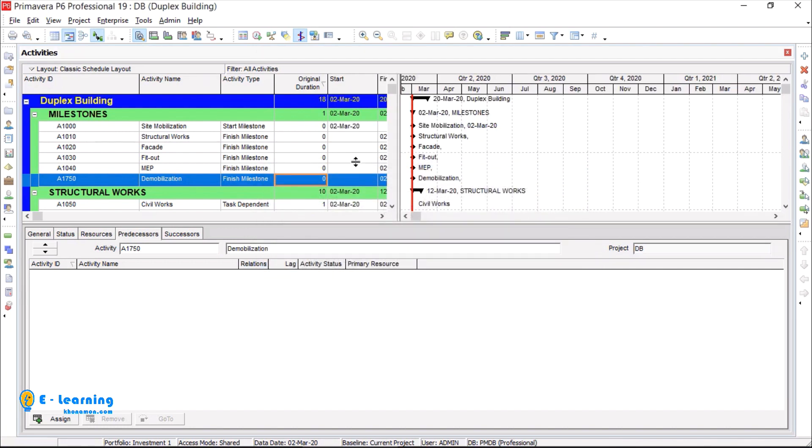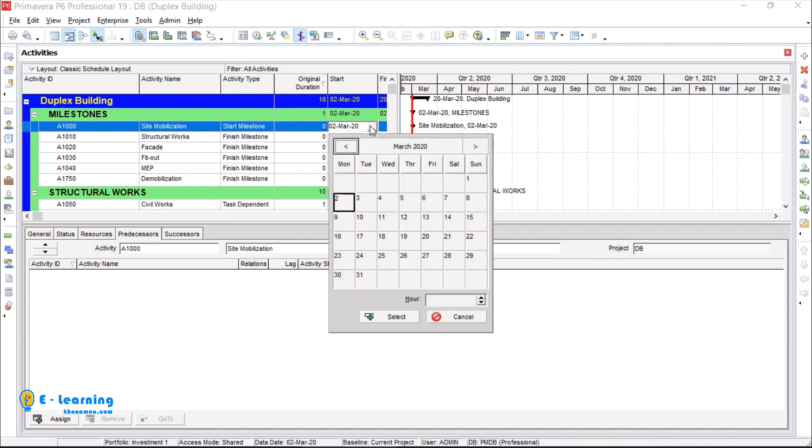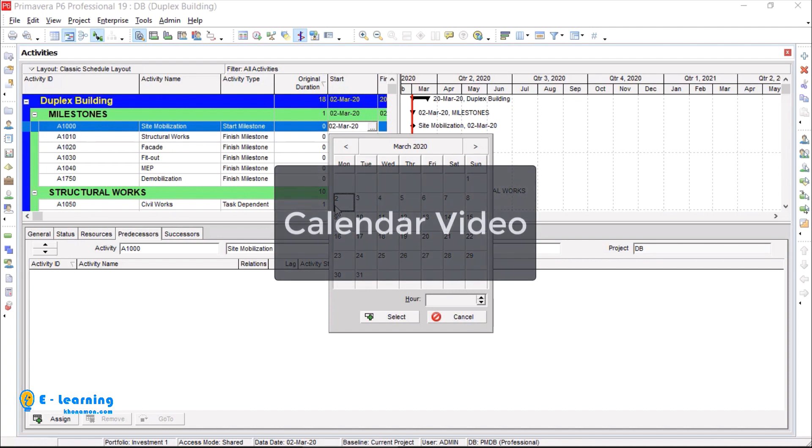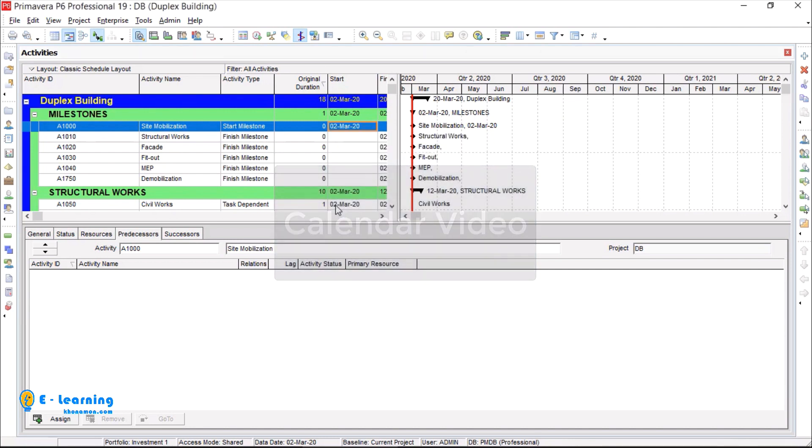Okay, my first activity is site mobilization. It is a milestone without duration, but I need to give a start date. With these three dots on start column I can see the calendar. First of March is Sunday, and because we are off on Sundays I select second of March. Also, if you remember in calendar section for project start date we selected second of March. I double click on it.